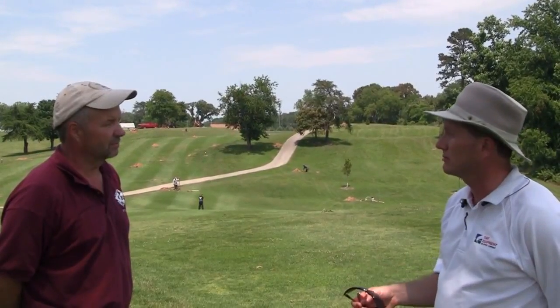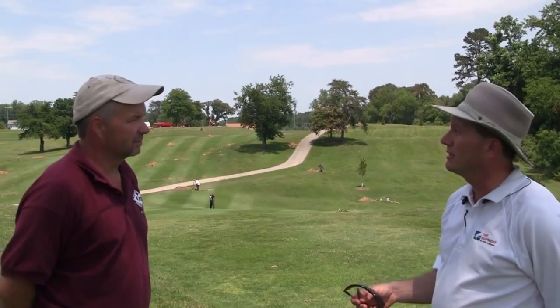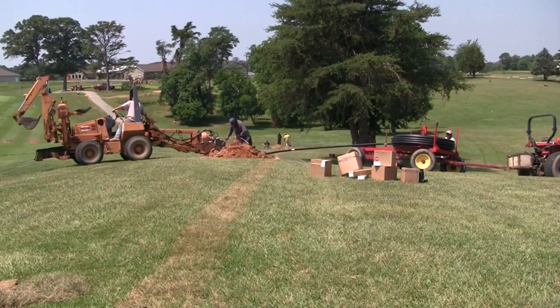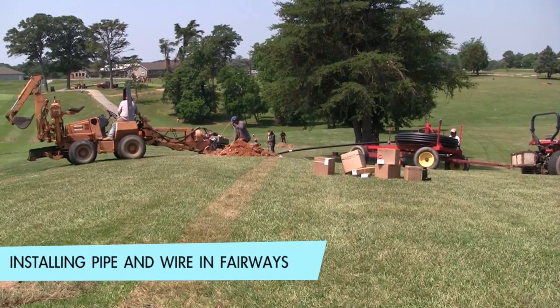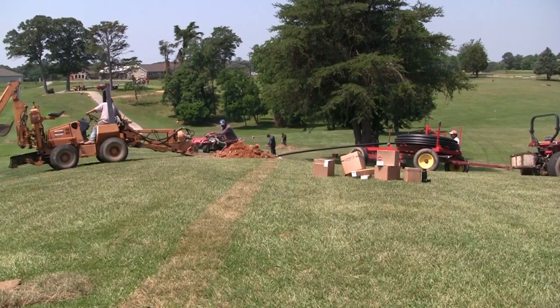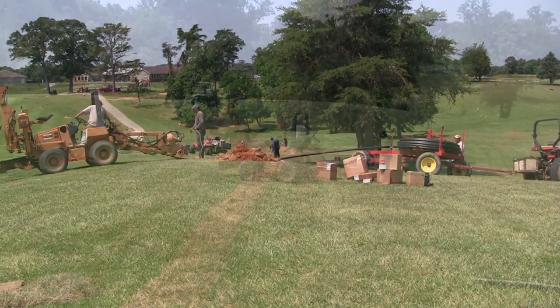Almost the end of June. We're coming into July next week. Right. I know this was never planned on being a summer install, but what kind of an impact is that having on the golf course and on the golfers? Well, the golfers are 100%. Well, let me backtrack a little. We expected this to be begun this previous fall of 2012. Unfortunately, we got to start in late May of 2013 with our projected finish date 3rd or 4th week of July this year, in a month.